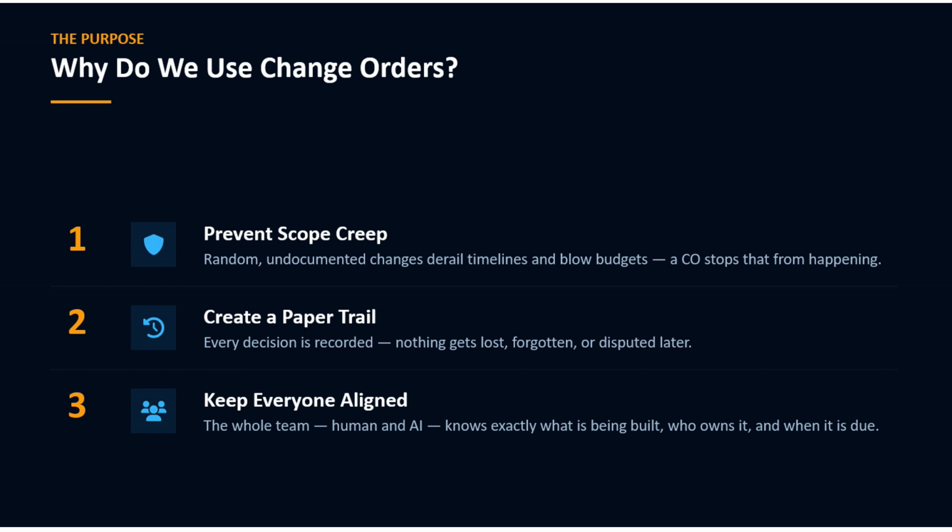All of a sudden you've changed the design architecture of the software, like the house. If you didn't have that documented trail of change orders of what you've built, you can't figure out what needs to change and get rebuilt or reworked in the process. So a documented trail allows you to do configuration management using AI, artificial intelligence. Without that, you're going to have a real mess on your hands.